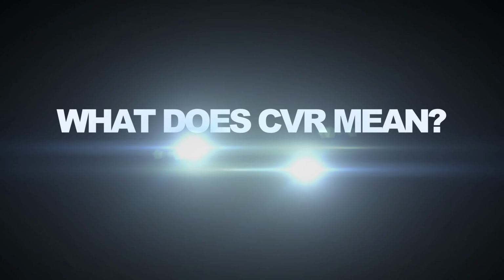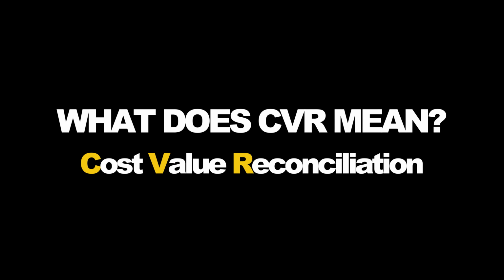All right, so let's get straight into this. So first, what does a CVR actually mean? What is it? So CVR stands for cost value reconciliation. In plain English, it's a report that compares the value of the work done against the cost of delivering the work. So the value of the work done versus how much it costs to actually deliver that work. That's the basic idea.